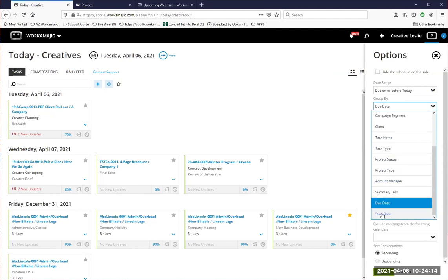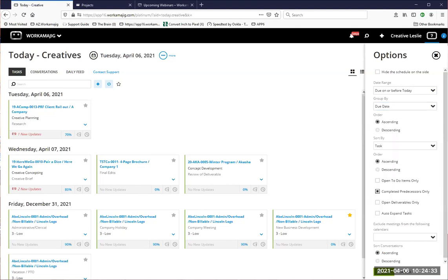Or maybe I want to know, because mine are all long term, maybe I need to see when should I start a task, because everything's due at the end of the year. Well, that doesn't help me. Maybe I need to organize it by when I should start something, because some things require more time than others. I'm going to leave mine as due date at the moment, but I did change the date range, and I've also got checked here completed predecessors only, and we'll talk about that in a moment.